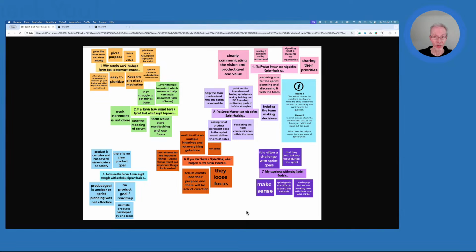Okay, so the product owner brings a business objective, the Scrum team collectively creates a sprint goal, and the developers commit and pick the work. So, of course, it's completely useless to first pick the work and then, for whatever reason, because you probably feel better or believe you have to do this to make Scrum work, bolt an arbitrary sprint goal on top of it. Complete waste of time.